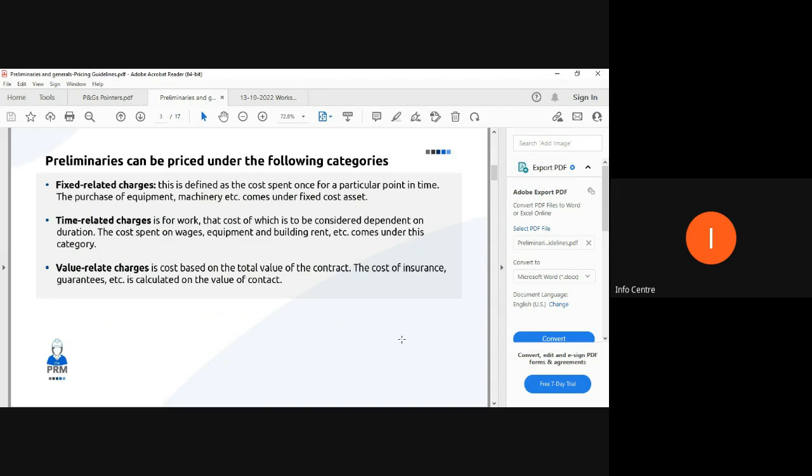Because what it does is, a smart QS or consulting engineer, when they put together P's and G's, will always have contractual obligations, and they'll always refer you to a particular contract that they are using. What that does is it makes sure that your BOQ is governed by a certain contract, and it gives you, as well as them, the right to go to that contract and ask for certain things based on it. So please pay attention to that, because that can catch us off guard.